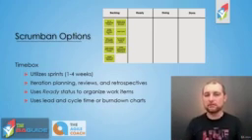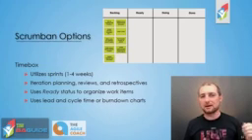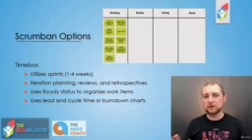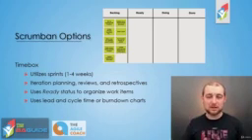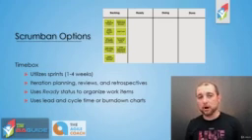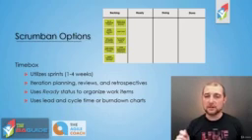You're trying to keep this moving forward, and having that burn down chart, it's just hard because do you do it based on the ready? Do you do it based on the backlog? How are you supposed to know? The backlog items don't have estimates, and it just gets really messy. I think most of the organizations that use burn down charts in the Scrumban are those that are coming from Scrum to Scrumban to try to get away from a little bit of that structure, and maybe burn down charts are just what everybody's used to on the projects, and so they continue to use it. But our recommendation is that you use lead and cycle times for your key metric for the time-box Scrumban.